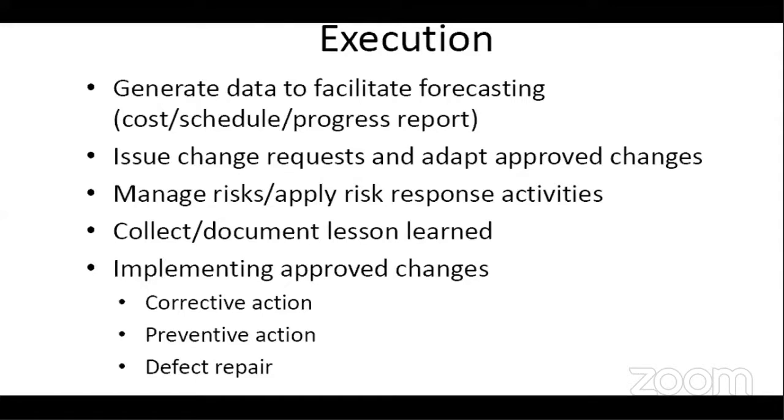So while we execute, this is where the M&E comes into play. The M&E is the primary function that helps us know whether there are changes, deviations, or variations. Those deviations and variations we are seeing are identified through the M&E process, which comes to us as changes to the project plan. So everything still goes back to integrating or updating the project plan to keep the project on track. Remember, I said these changes could be coming from the assumptions we saw in the feasibility study we carried out before we established the charter.